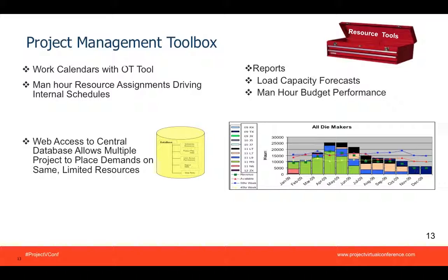So the primary output report is a monthly resource capacity forecast, which you see in the lower right-hand corner. Literally almost all the companies in automotive today, especially tier 1s and tier 2s, forecast or attempt to forecast their resource capacity. So what does this chart represent? The bars are resource demand. The resource demands are those demands required to meet the schedule. The line chart shows the capacities of the resources using alternative overtime work schedules. So you may have a 40-hour line and a 50-hour line and a 66-hour line with different amounts of capacity based on the amount of overtime planned to work.